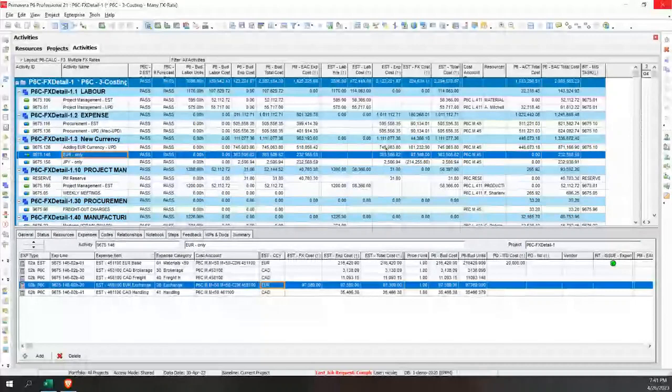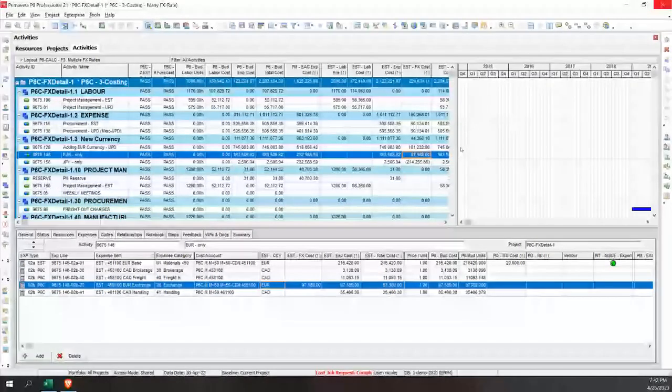Okay, so in this case, the exchange rate is here. It's in its own field, so we can see the total amount of exchange rate required for this. Now that's broken out into the actual currency. So when you have a team that has to go and hedge the currency and pre-buy euros, it is important for them to have this information at their fingertips. And being pretty accurate, because we've got a date on this.